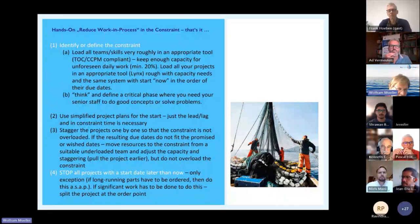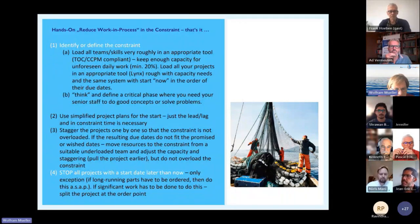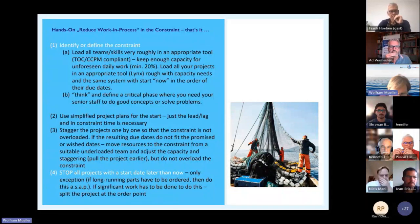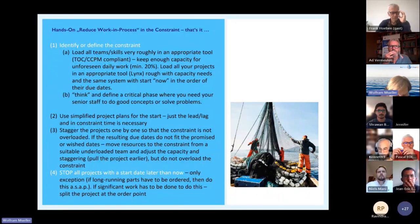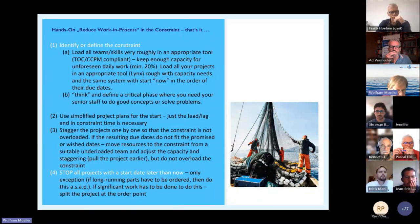That's the hands-on part. We experimented with different ways, and in the end you have to do four things: first, identify the constraint; second, have very simple project plans; third, stagger the projects by the constraint — the most critical resource or virtual constraint; and fourth — the most important one — stop working on all the projects that do not go through the constraint at that time.